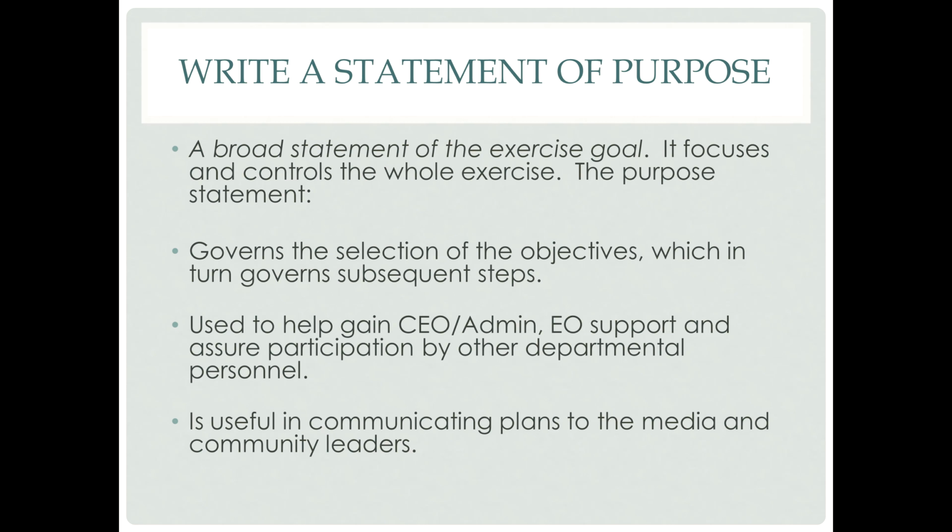So this is a broad statement of the exercise goal. This is going to be the statement that you give to your leadership, to the media, to people that you want to have an understanding about what the exercise is about. It focuses and controls the whole exercise. So the purpose statement governs the selection of the objectives, which in turn governs the subsequent steps. So you write a statement of purpose, then we're going to be creating the objectives, and then the objectives help us to identify the tasks that we want to achieve, and then it kind of filters from there.